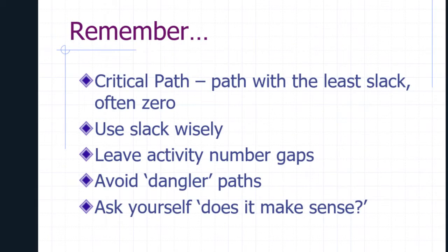Now, from the point of view of the project manager, the slack is really helpful because it gives us some flexibility to decide how we schedule our work. It's a benefit to us. We wouldn't want to see a project with critical paths all the way through, so that every route through had 0 slack. We have to use it wisely though. It's not free. It's something that we need to consider.